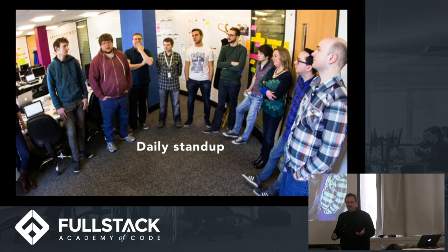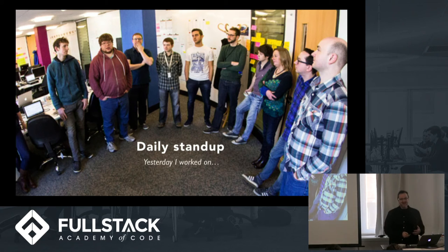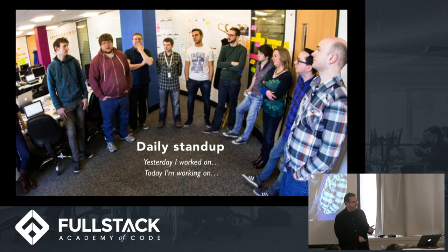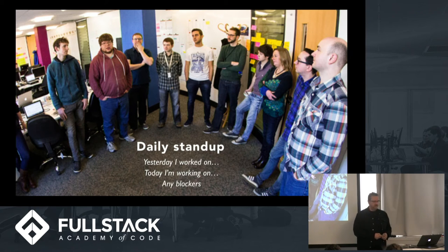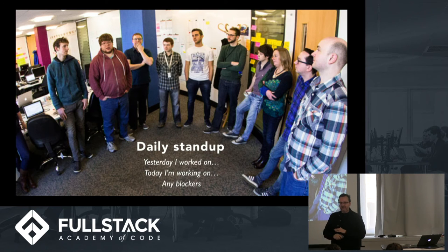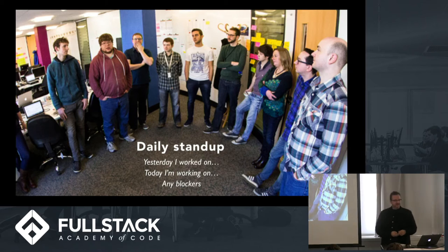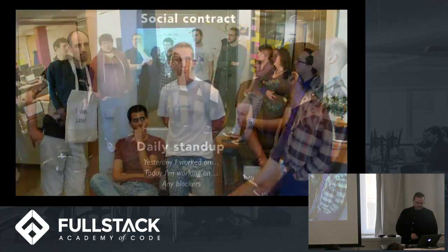Okay, there's also something called, like I mentioned before, daily stand-up. If it's well-run, it should be 5 minutes max, right? Everybody goes around, just says, yesterday I worked on, dot, dot, dot, today I'm working on, and if I have any blockers, right? You don't go into any detail in stand-ups. If any discussion is required, you just acknowledge, hey, we should talk about this, and you schedule time to talk about it after stand-up.